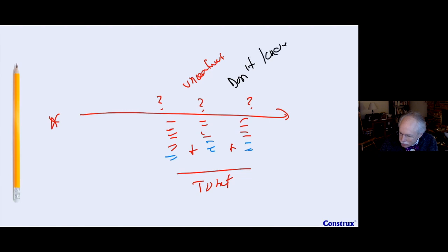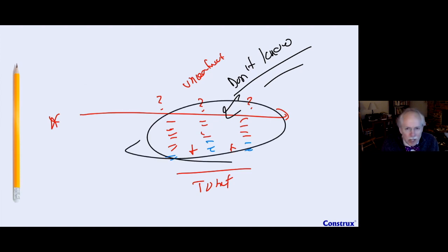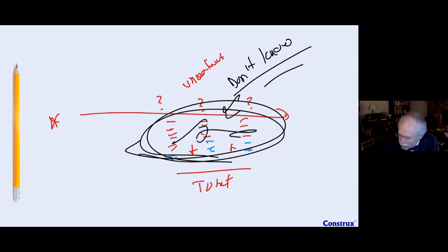I really don't know. I'm just guessing all this. And if I'm guessing in all that detail, why don't I just guess the whole big block of it with my most likely and make it much faster? In fact, if you follow a reasonable guessing process where you have a good multiplier and a good process, you'll make a better guess with the big blob of it, not worrying about all this detail, than you would guessing all the little detail.